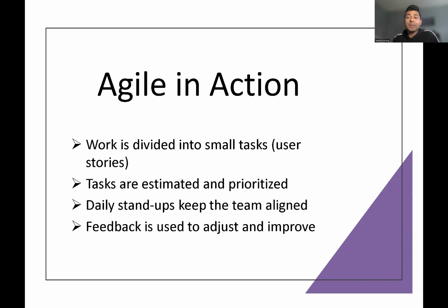Daily stand-up keeps the team aligned. So in daily stand-up, all developers, product owner, business analyst talk about what are the things they did yesterday, what they are going to do today, and if there's anything which is holding them off. So they can discuss it, and at the same time, these daily stand-ups make sure that everyone is aligned as well on what exactly you are doing. So as a BA of the team, as a product owner of the team, I know, hey, my product is being worked on, I will get an update every day. So there's very little chance of making a mistake in the sprint.